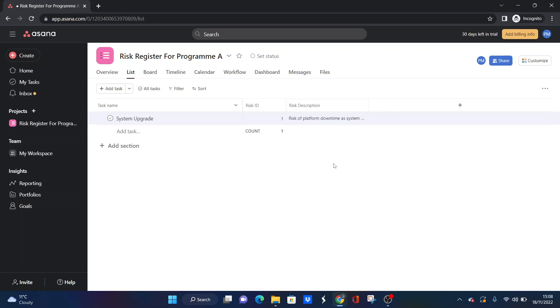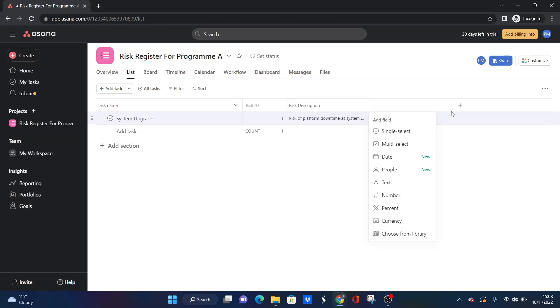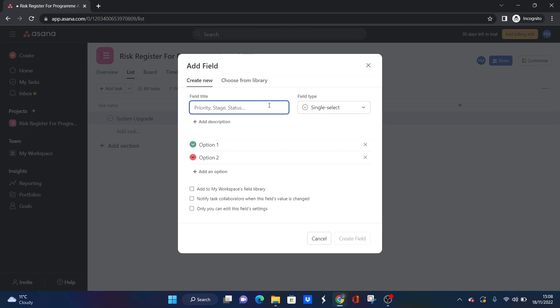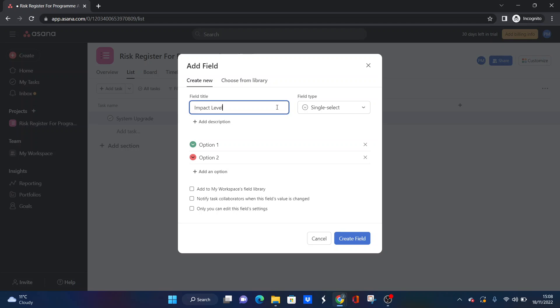So we're putting that risk description in. Anyone who's looking at this risk can hover over this and just see exactly what it's all about. The next thing we're going to put is the impact level. So if this risk were to occur, what is going to be the impact of it, essentially? And we're going to change this to a single select. Imagine impact as in if the risk were to occur, how much of an impact the organisation is going to have. Five being massive impact, one being a noticeable risk, but maybe doesn't affect your day-to-day operations. One to five is a scale that's often used in project management methodology and is commonly accepted. And there's a benefit of using one to five, and I'll show you that in a moment.